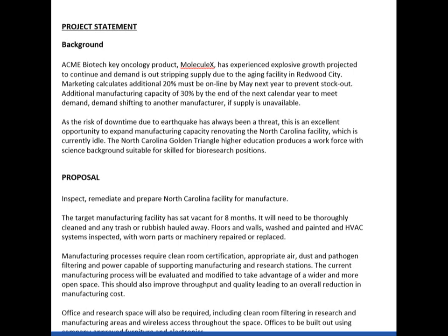There's very little consistency organization to organization on what is documented, what that format looks like, and what it's called. However, my personal opinion, we should always be answering the same 5 questions in whatever we produce to initiate a project. What is the project? Why are we doing it? How are we doing it? When are we doing it? And who is doing it? Who is involved? So we begin with a statement of background.